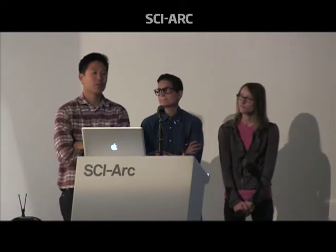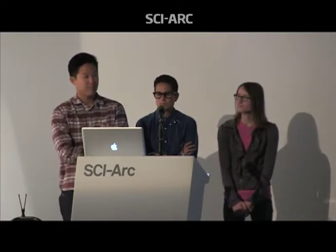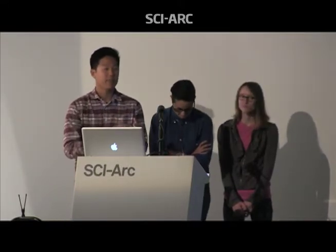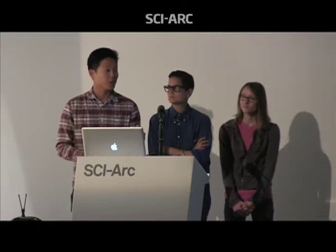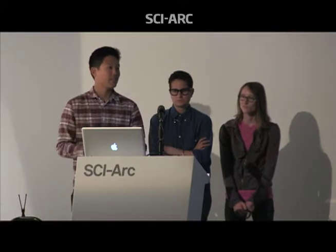Another huge lesson that we learned is value engineering. This is a scheme that we did in December, last year in the fall. They gave us a legitimate cost estimation, and based on that, they tell us how many points we're going to get in the actual competition. So we came out at like $500,000 our first round, and that's when we had 3 moving modules, and had this crazy parametric skin that we designed on top of it.